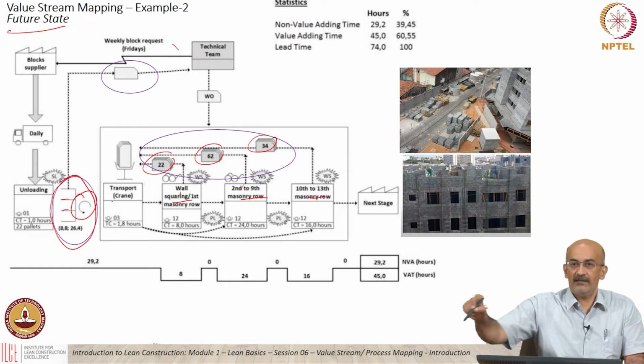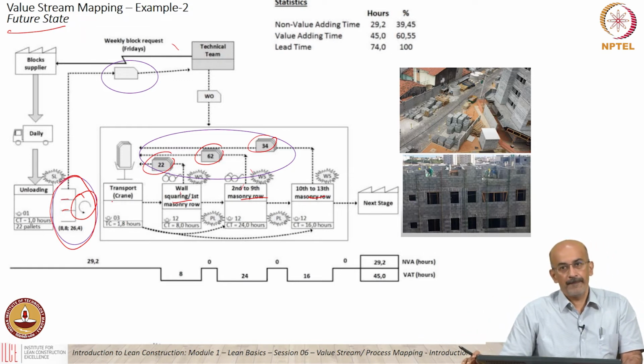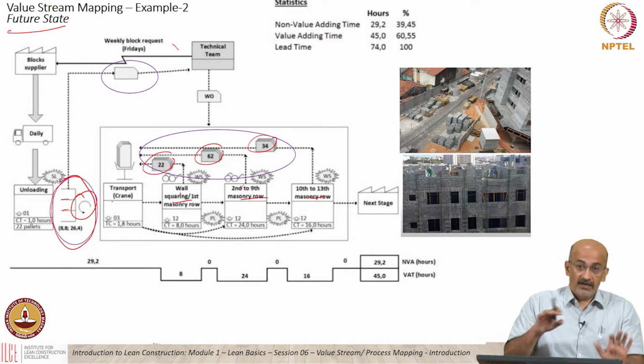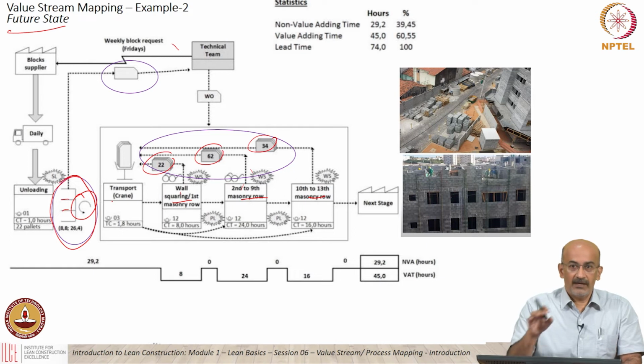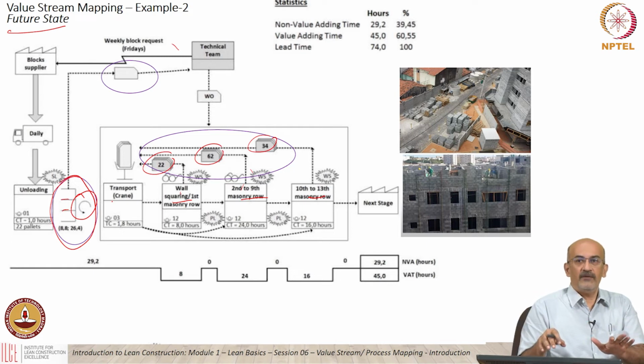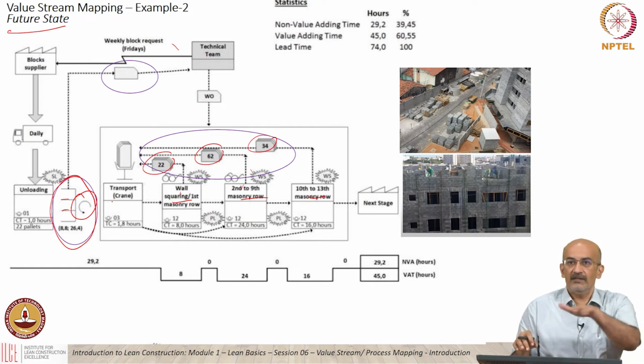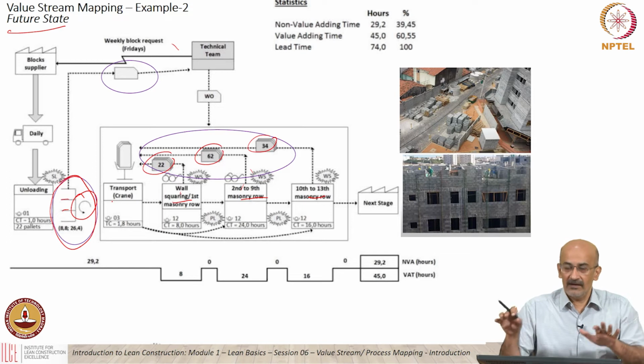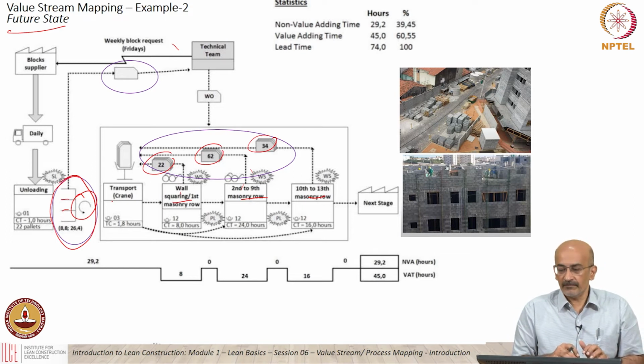the crane then takes it. But sir, in that case, the crane may be more idle. There is a waste. No, if it is only for the blocks, yes. But the crane will have other tasks also, and then this will be there. You give enough advance notice during this time. So it's a more structured, organized system, which is not typical on a construction site. Okay, construction sites tend to be more ad hoc, but that causes a lot more waste.